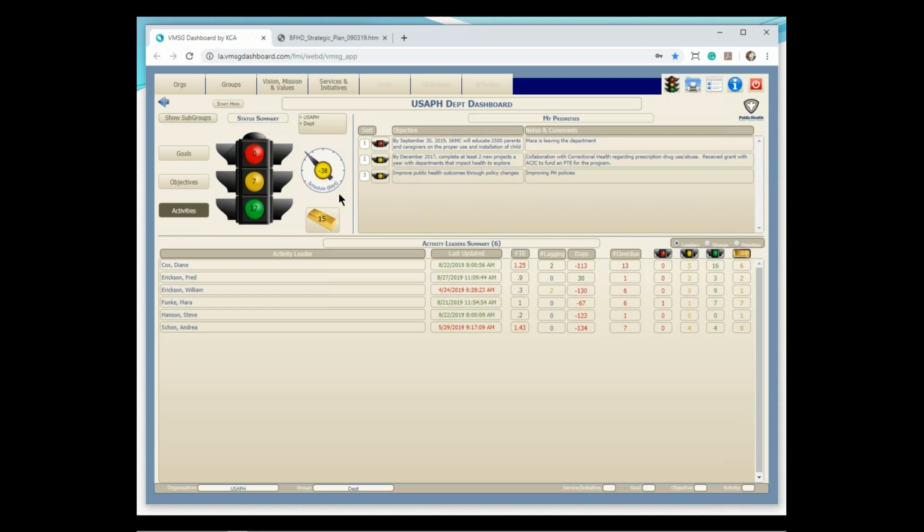And if we're on schedule, it'll be green. So if you're looking at green or yellow, you're probably fairly good. Most schedules are fiscal year long, so 38 days is a little around 10% behind schedule, not too bad. Now, if I want to drill down a little bit further after I look at this, I can go down to the bottom here. And there are three different views here.